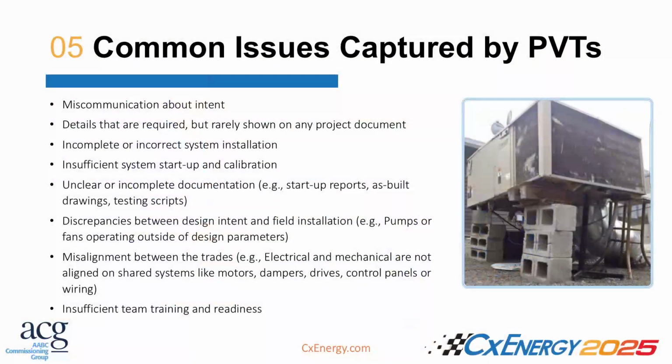And it's a chance for any questions from the people in the field to get back to the design team. If RFIs need to be written or SKs need to be drawn, you still have a chance to do it before it becomes crunch time, right? And that's the whole point of trying to get these pre-verification tests set up in advance. And I know some of you are thinking that's an extra step, but it's not really an extra step. The contractors, the CMs own the work, so it's just another pathway to get there. If you don't do it, then you risk not finishing the project on time.